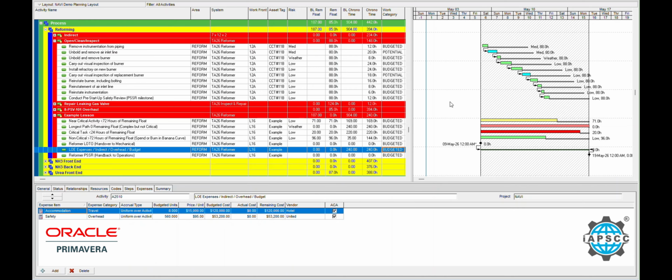I use relationships, strategic logic between job packages, sparingly, and I do not tie activities to milestones. It's not necessary. I only use relationships when strategically bundling job packages within a system or workfront, for example, parent equipment and its children. In addition, you can see how the float bounces off the window like a radar, giving me earned value and float melt or burn indicators.